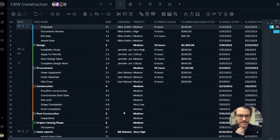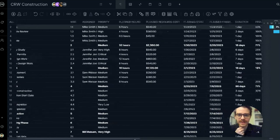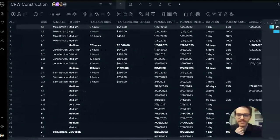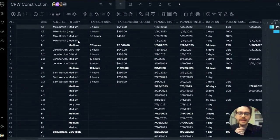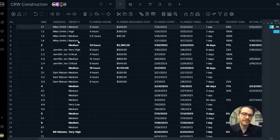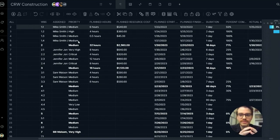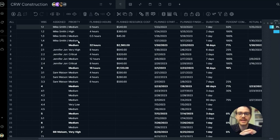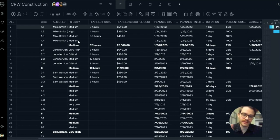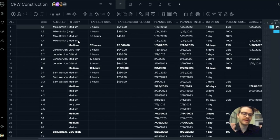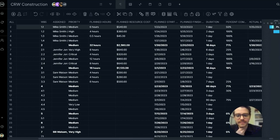This is the assigned column, simple enough. Priority, simple enough. Now we're at the planned hours and planned resource costs, so we're looking at resource management features. Mike Smith's been assigned to the task. It's going to take Mike Smith six hours and he makes, let's say, $50 an hour. Multiply 50 times six and you get your planned resource cost there.